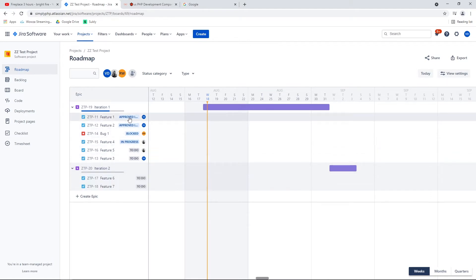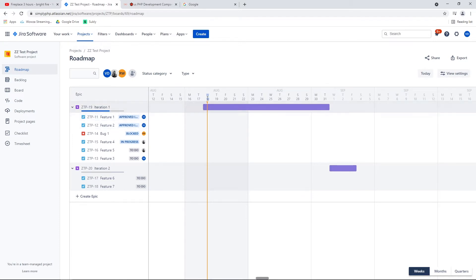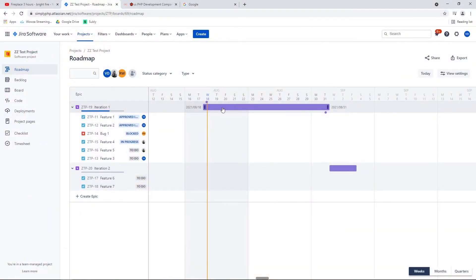Jira operates a roadmap as well — that's where we do our iterations. In a period of about two weeks, you'll know exactly which tasks we'll be working on. You can keep track of that and export it easily, sending it to clients so they know what's coming up this week, next week, and in the weeks to come. That purple bar on the roadmap is a result of estimates or timelines inputted into the various tickets.